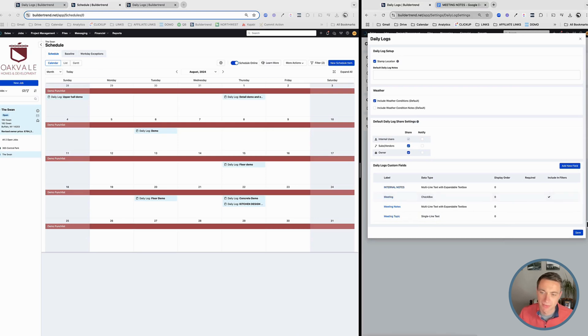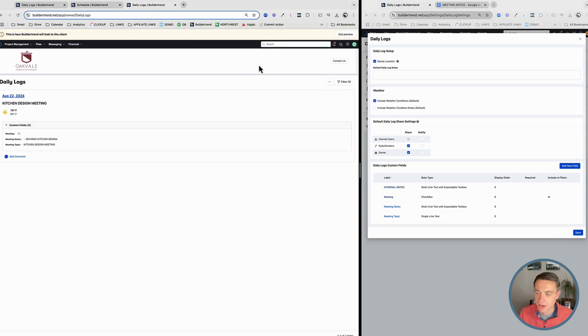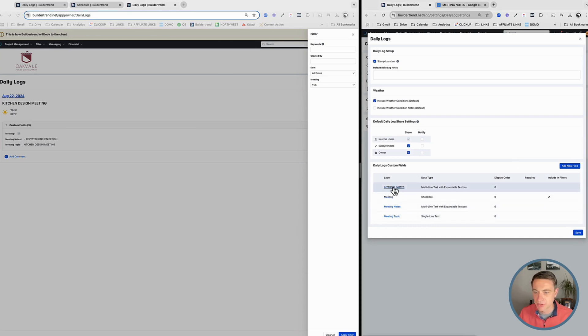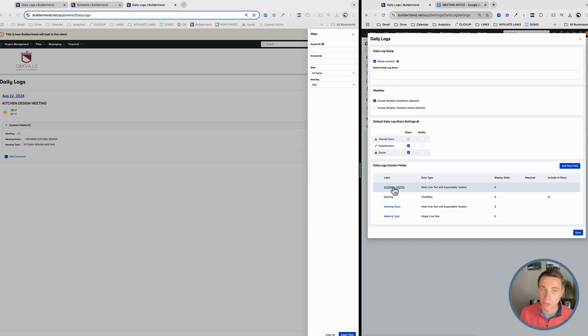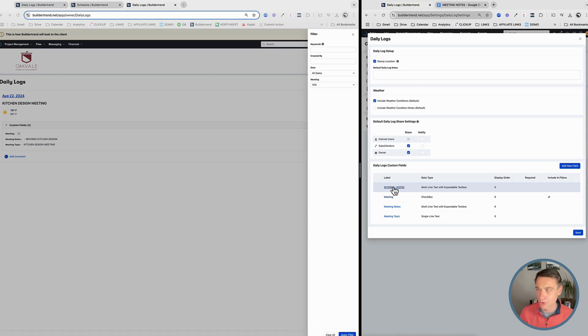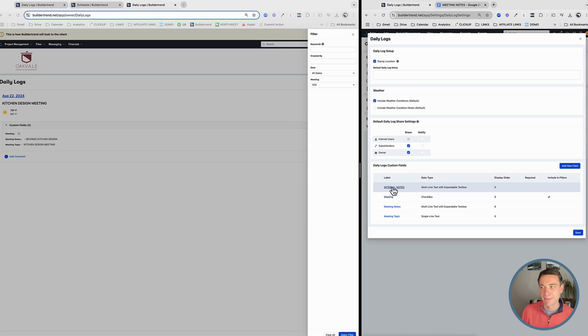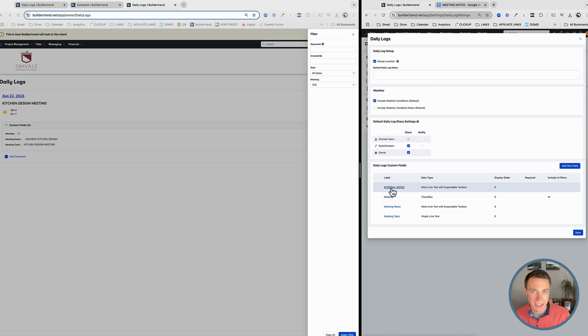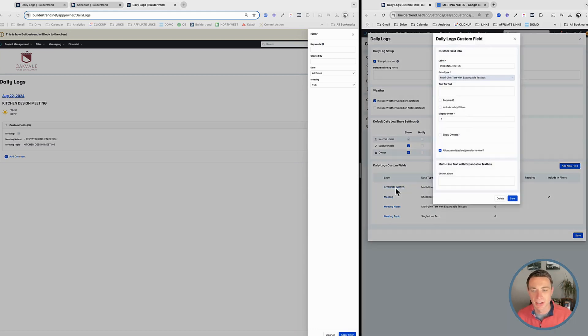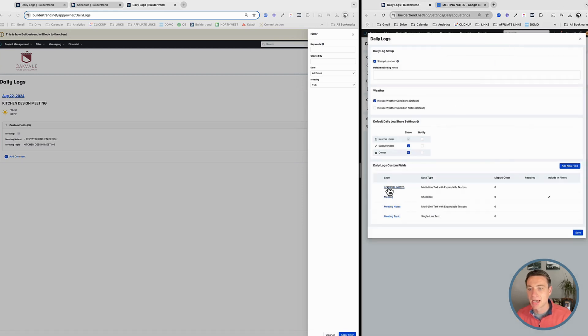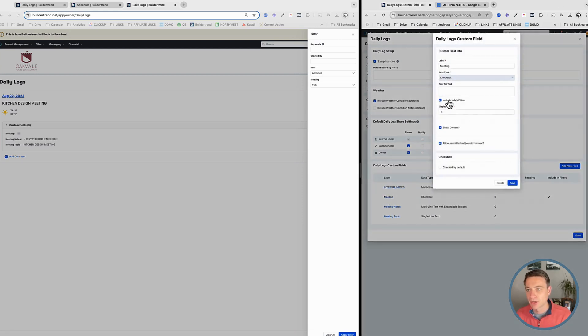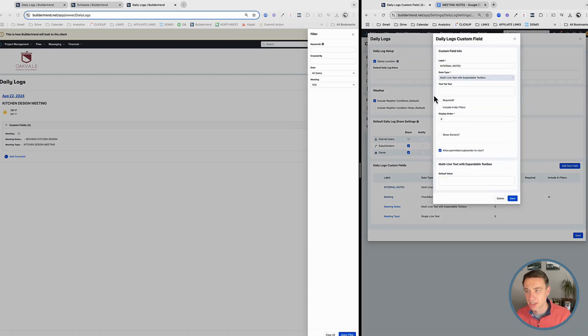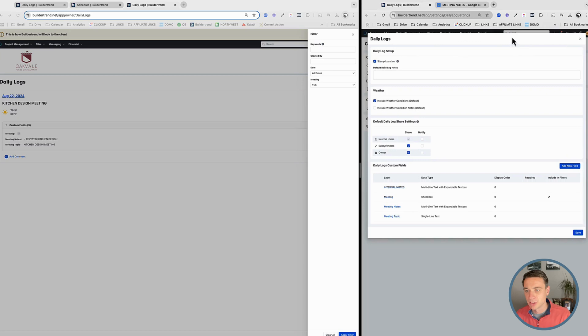Now here, down here is our custom field. So I have a check box for whether or not it's a meeting and here include in filters is where for the customer, I'm able to allow them to filter that. And for myself, meeting notes, meeting topic, internal notes is a good one as well. So I don't use this too much, but sometimes our team has some important information that we want to put in the daily log, but for whatever reason, optics, it doesn't look great to the customer or they just, we just don't feel they need to know it yet. We'll put it in internal notes. So one example of this would be like, maybe the customer picks something out, a tile. And then we, for whatever reason, we don't love it. It's just not going to work well. We might want to put that in internal notes to kind of escalate up to the management team so that the customer doesn't see that, but the management team knows. And maybe we deal with that situation delicately and say, hey, listen, we have to revisit that tile selection. So we could maybe do that. So we have internal notes, which is not shown to the owners. So when we create custom fields, we are telling the system whether or not we want the owner to see it or not. And this internal notes, we do not do that.